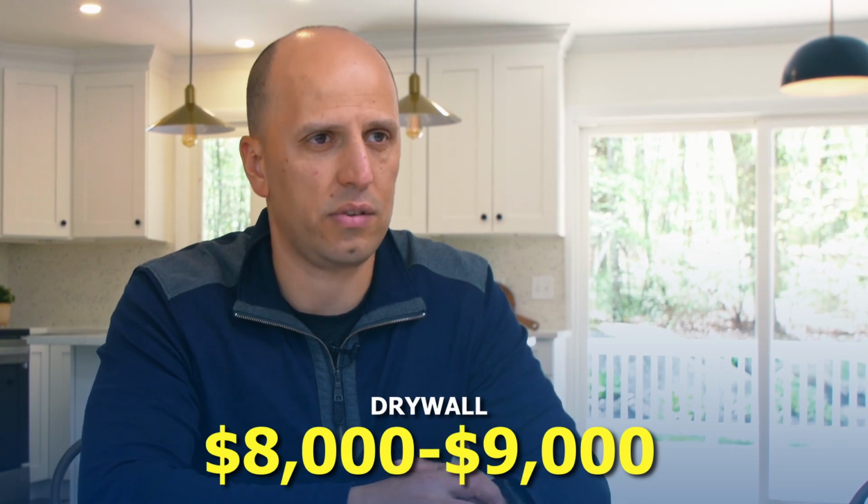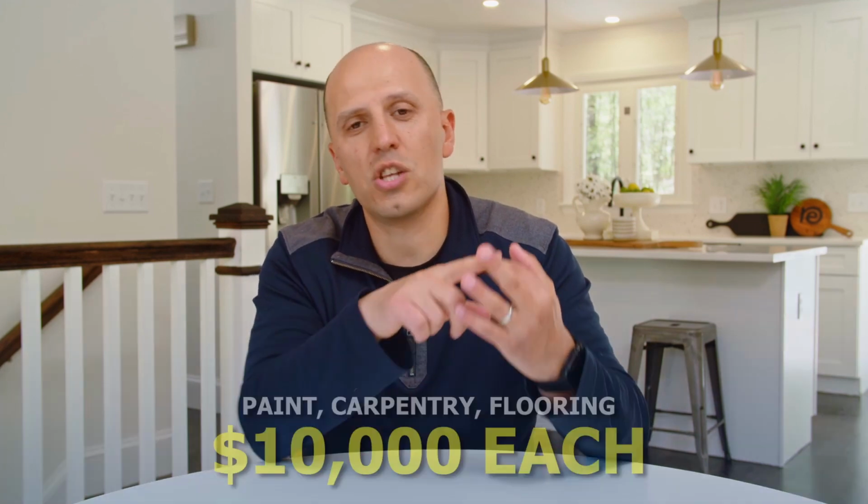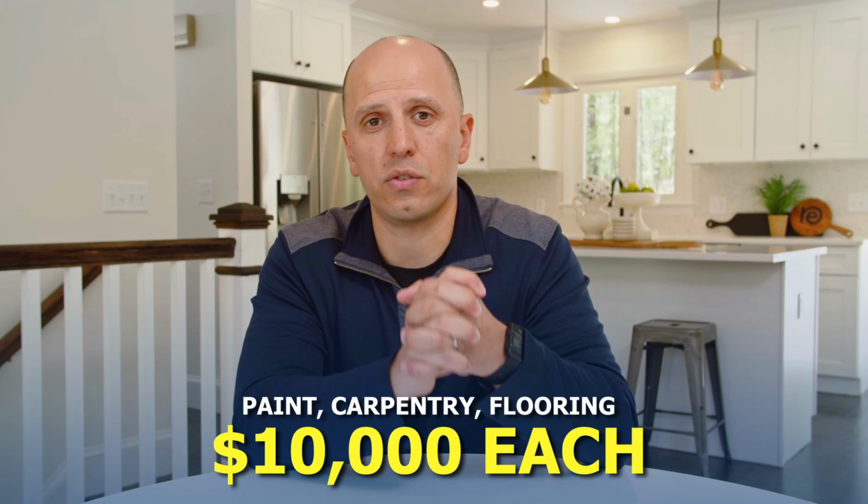Then you got insulation, right? Then you got drywall. I think drywall bill was around $8,000 or $9,000. That is just to get this place ready to be painted. Then you got paint, you got finished carpentry, you got flooring. So each one of those, it's close to $10,000 each. So everything adds up, but you need to be able to come in on day one and itemize each individual trade and put a dollar amount to it.